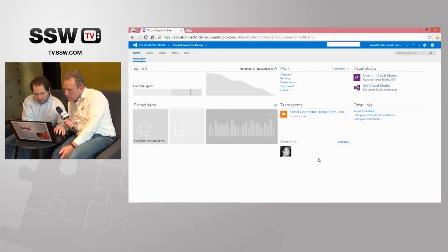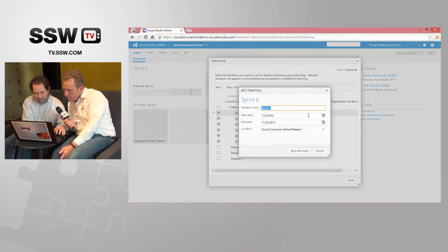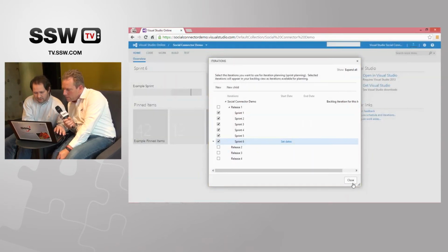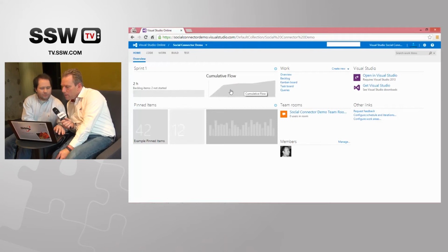But for example, let's say here that you don't have a sprint with dates. Yep. I will remove the dates. So people like to work on sprints, but sometimes without dates because they don't have that kind of pressure. They work in a kanban kind of way. So we will see here that I will replace the burndown chart with the CFD, so people can see the CFD directly instead of going to the backlog and seeing it. So since the burndown wasn't going to be visible, it makes more sense to have a CFD. I hope the team sees this. This is a good idea.